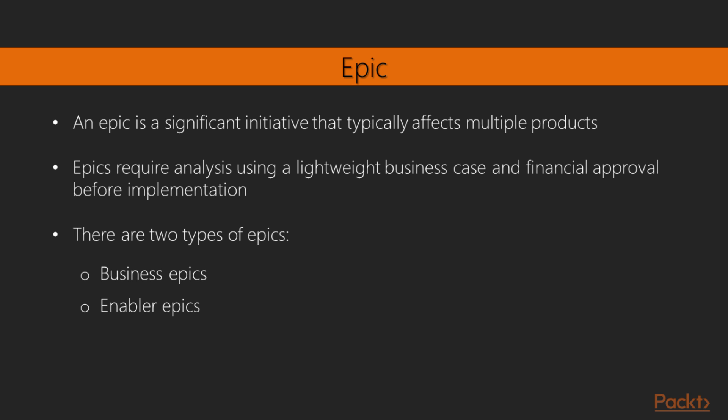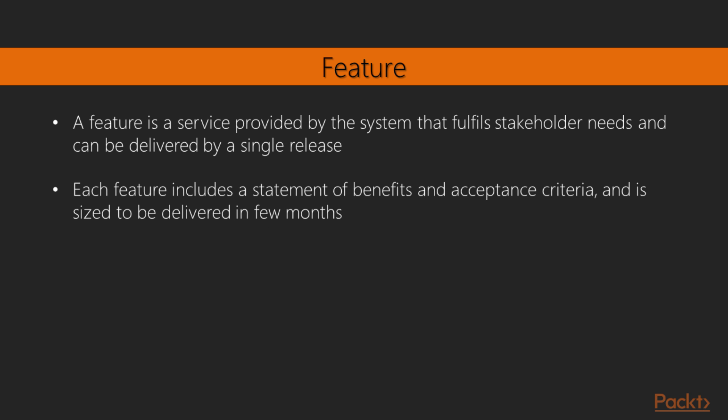Enabler EPICs are initiatives that do not deliver direct business value but are necessary to put the organization in a position to be successful for the Business EPICs — for example, the implementation of a cloud strategy. A feature is a service provided by the system that fulfills stakeholder needs and can be delivered by a single release. Each feature includes a statement of benefits and acceptance criteria, and is sized to be delivered in a few months. We can adopt text patterns such as 'In order to [goal], me as [who], deliver the benefit [I want / scope of the feature]' for describing the feature, as well as 'Given [context/condition], then [expected result]' for defining the exit criteria of the feature.